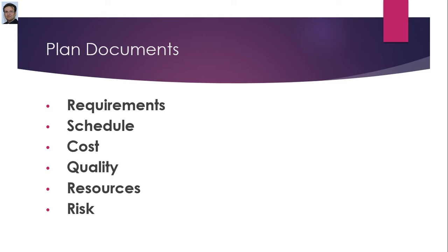And the risk management plan provides information on risk related roles and responsibilities, indicates how risk management activities are included in the budget and schedule, and describes categories of risk which may be expressed as a risk breakdown structure.